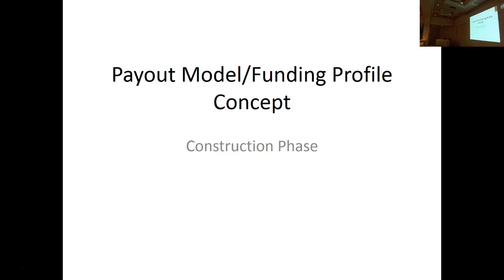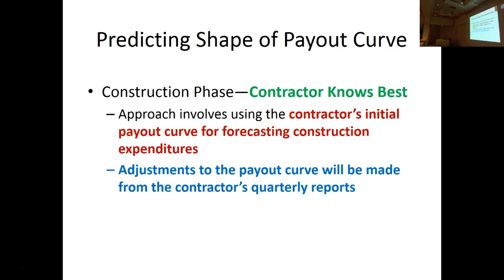And finally, moving on to the construction phase. Now you're in the construction phase, and even there, things move around. For mega projects, the contractors are required to provide the owner with their expected construction expenditure curve right at the beginning.